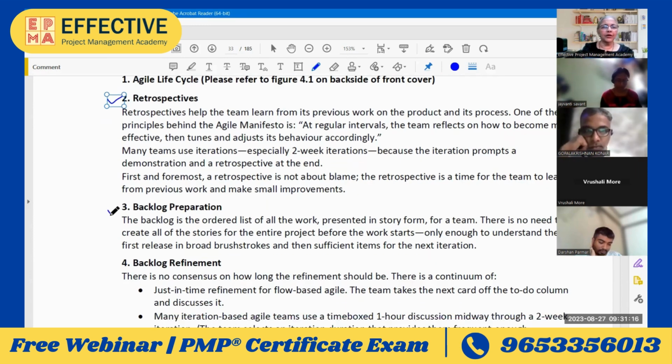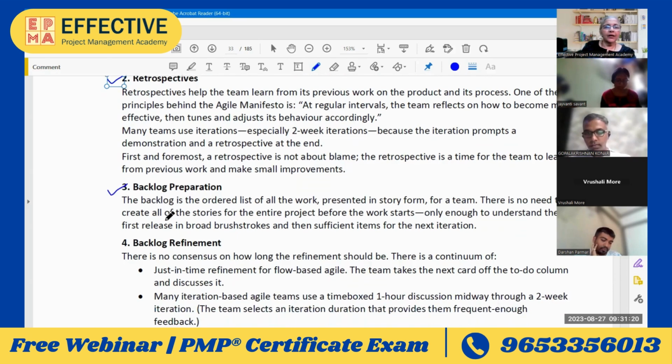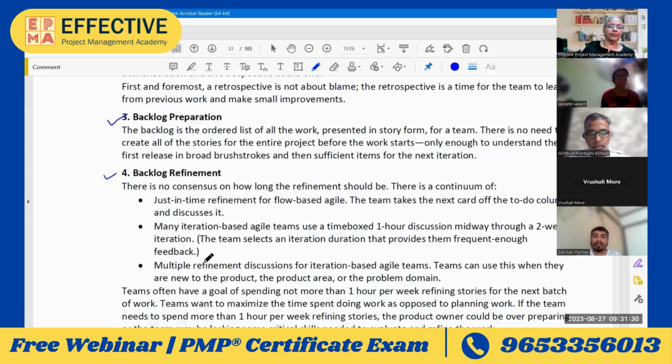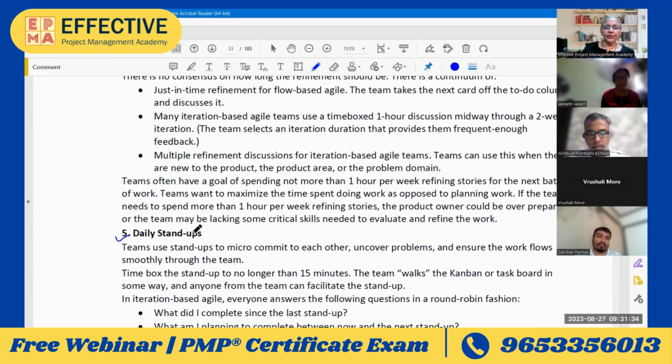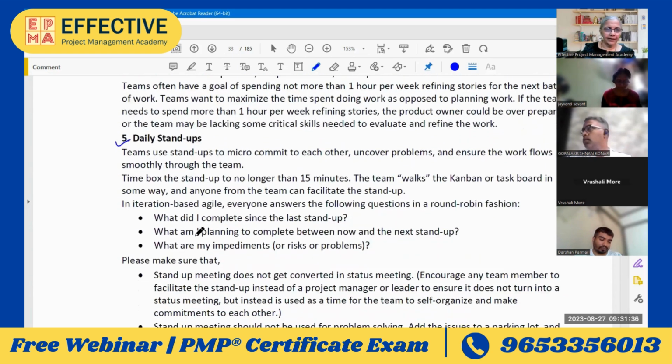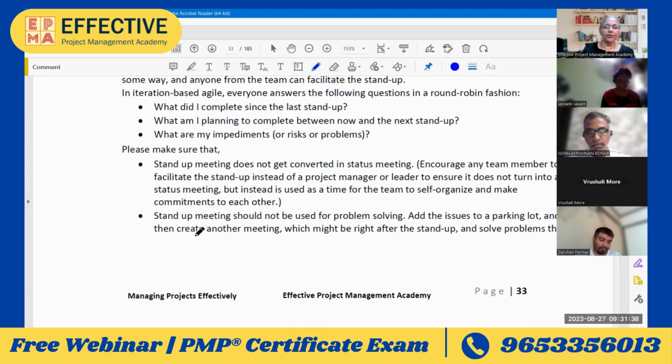Backlog preparation, refining the stories, getting the stories ready. So backlog refinement, I'm sorry, backlog preparation is ordering the stories, and backlog refinement is getting the stories ready. Daily stand-ups. We talked about that yesterday, so you might want to read in detail.